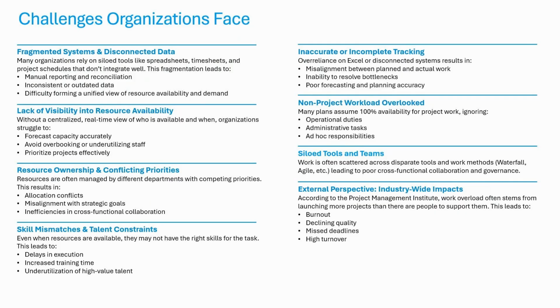Many organizations don't factor in appropriately their non-project workload, and we'll talk about that a little bit today. That means not everybody is available 100% for project work that comes in, and we may overshoot by not factoring in that dimension.